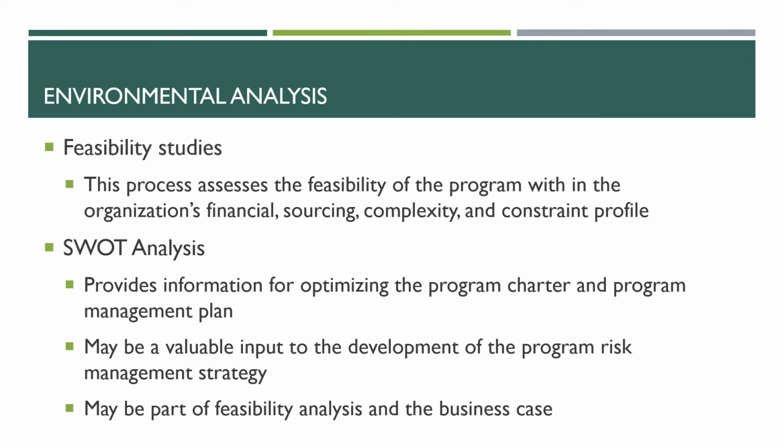This process assesses the feasibility of the program within the organization's financial, sourcing, complexity, and constraint profile. Whether you want to go ahead with the program or not, this process will help you. SWOT analysis is a valuable input to the development of the program risk management strategy. It provides information about optimizing the program charter and program management plan. It could be part of a feasibility analysis or business case.